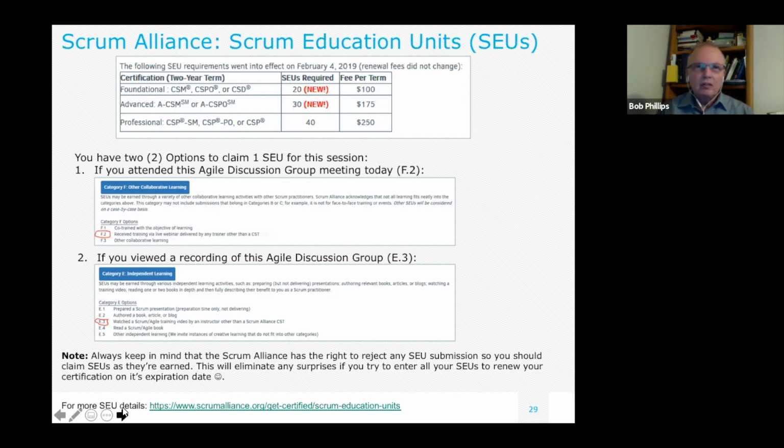If you ever want help doing this, reach out to me. If you're doing it for the first time, it's a little nerve-wracking. The other part of estimating is you have to get the team to come up with a base story, getting everybody to agree that doing this type of functionality would be 3 points. Then people compare that 3-point story to the next piece of work, because you're just estimating the effort. You're not estimating hours, you're just estimating how much effort it is.